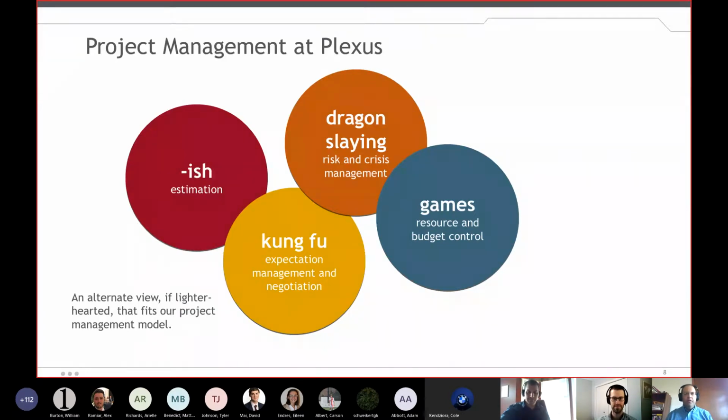Absolutely. And you can stage it. There's this notion within product development, and the Toyota guys did this. If you imagine you're going to come out with a new version of an alternator, there may be some cool, fancy new way to do it with materials that are hard to manufacture and hard to characterize. And there might be just a couple of tweaks you're going to do to an existing design. And you may try to do the bigger one, but you have to have a fallback position, so that at the end of the year, you're going to have something you can show off.